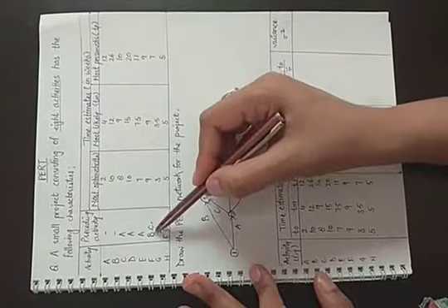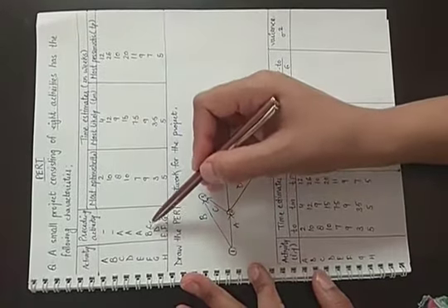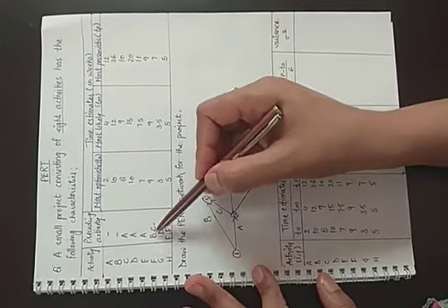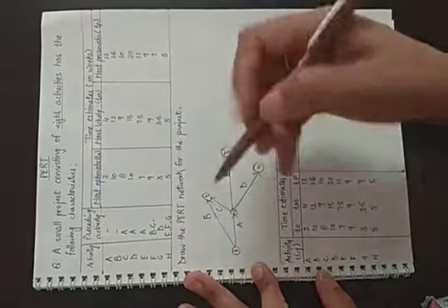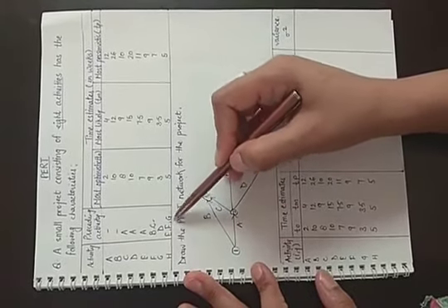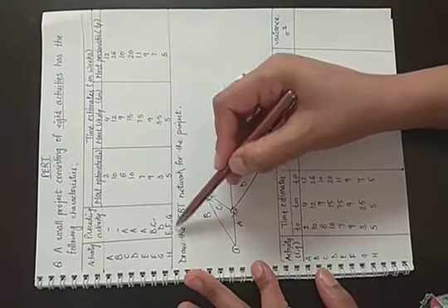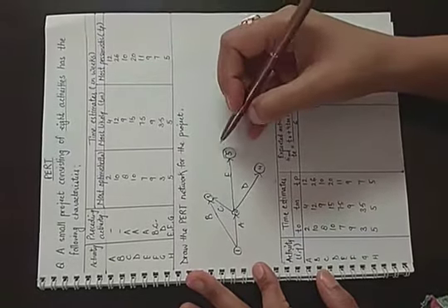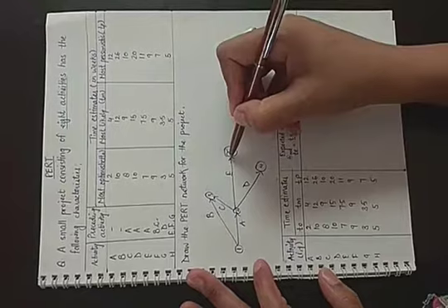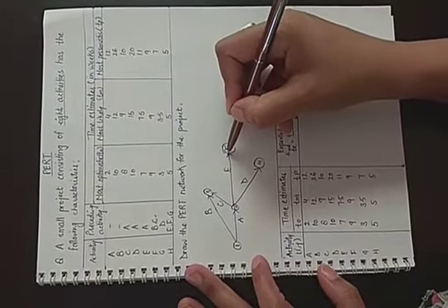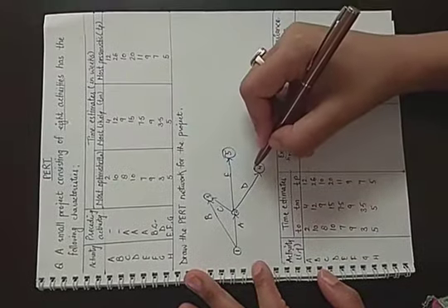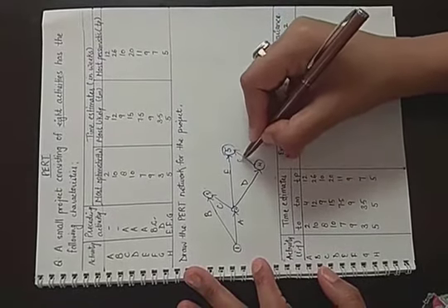B and C are the preceding activities of the activity F. So B and C make F, but E, F, G are 3 simultaneous activities and meet at a point: E, F and G. D is the preceding activity of G. So here G is matched.